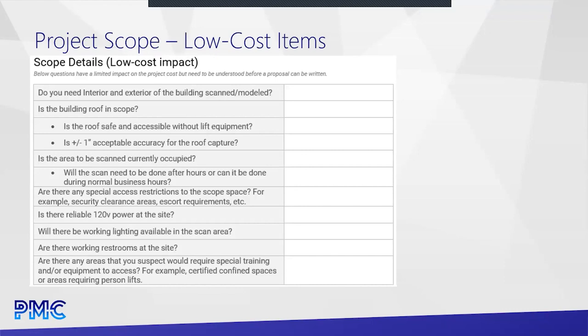If we're doing something like mobile scanning, we can be in and out of each apartment in 2 or 3 minutes. Is someone going to be able to open the doors that successively fast? Or are we going to drag this job out and it's going to take us an hour per unit instead of 2 or 3 minutes? Right? This has a huge impact on cost. But even if it's manufacturing, let's say, can we scan it while the business is running? Or do we have to do it after hours on holidays, those types of things?